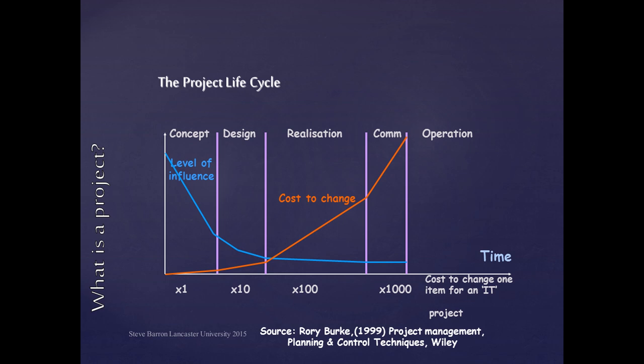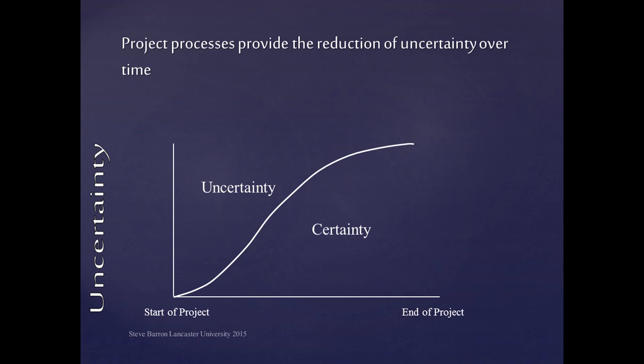This suggests that the project manager needs to be able to clearly define the project in the early stages, during concept and design. The problem is that often during these early stages there is insufficient knowledge about the project. The project team experiences a learning curve that suggests we don't know enough about the project until a time when it becomes expensive to modify the initial designs.